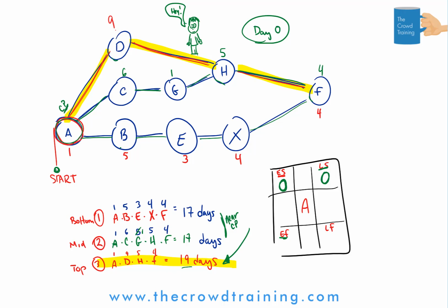Well, now the next question is, when's the earliest we can expect it to be done or finish? Hence, here is where the mathematics gets so much easier when we are saying if it's going to take us 1 day to do it, we started on day 0, what is 0 plus 1? See, brilliant, right? It is a 1. The earliest we can expect it is the end of that day. And likewise, the latest it can finish would also be that day 1. Again, fairly simple, thinking that if we started on a 0 and we're going to finish it on that same day.